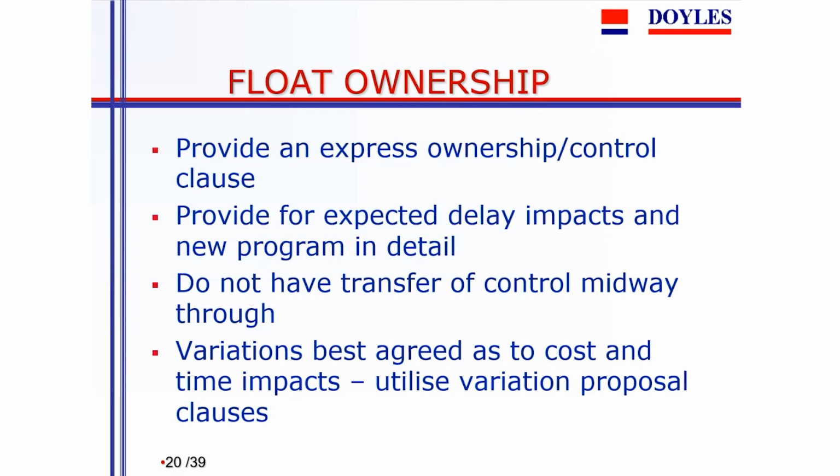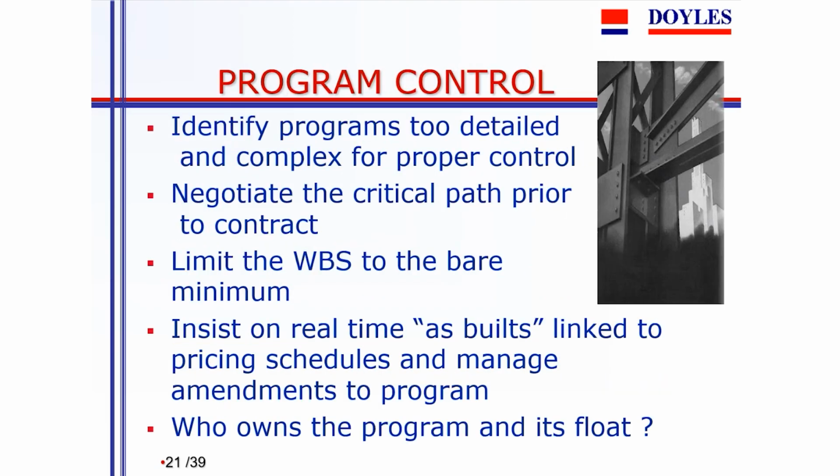Or is it a situation where the principal is requiring that float and expects the contractor to finish promptly in 10 months, not 12? Often there's a concern and a dispute between the parties as to what sort of leeway owning the float gives either the contractor or the principal, the opportunity of flexibility in their programming requirements. So if we go down another slide.